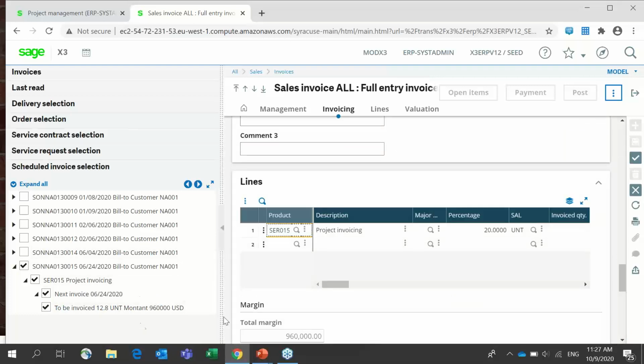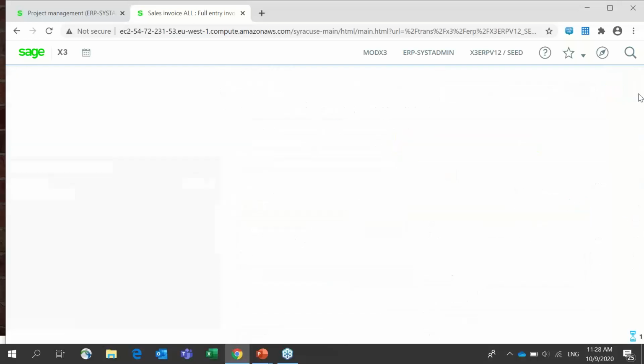It means the 20%, the T010, because T010 has the status closed. But the second scheduled invoice has T020, whose status is still launched, not closed yet. So I cannot invoice my customer. I'm not going to create it.